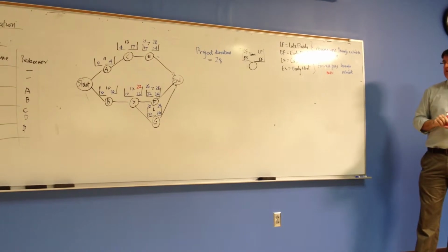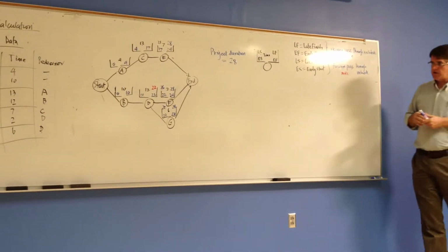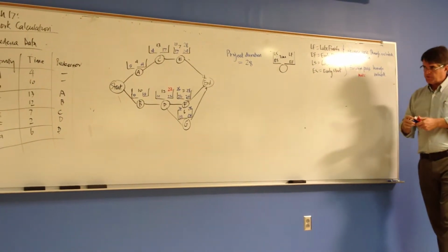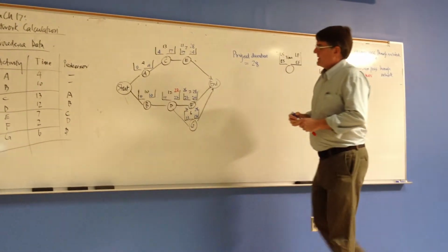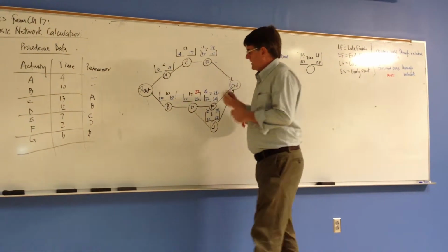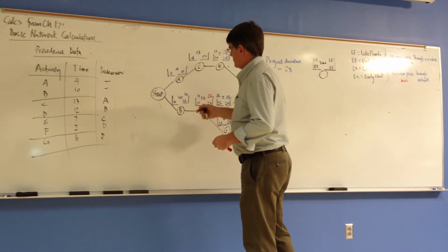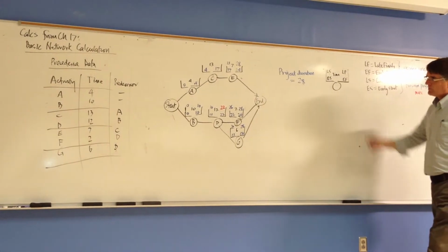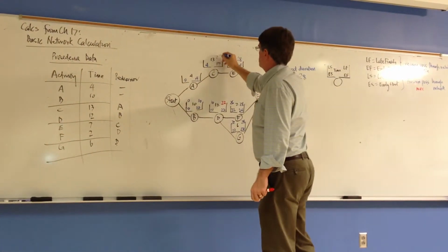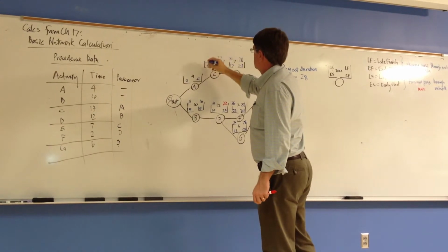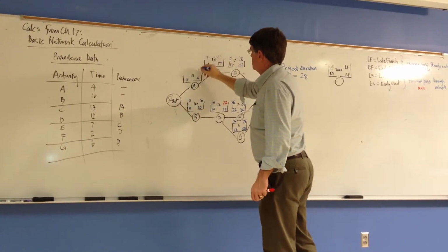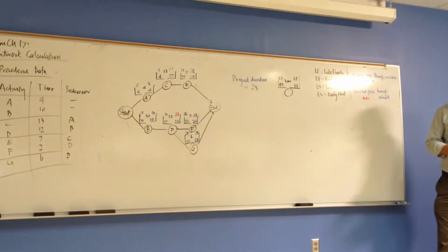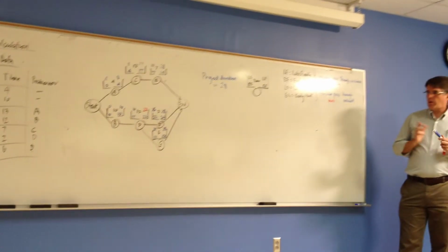So I will do another couple of examples for you to show you how these calculations work. This is our first example. But this is the sort of resolution that we want the software to square away for us. So if it finishes at the latest 22, I can get started at the latest at time 10. This one can start at the latest at time 10, finish at the latest at time 10, start at the latest at time 0. At the top, this one is 21 minus 13 is 8, and 4. Okay. So, what do I know?